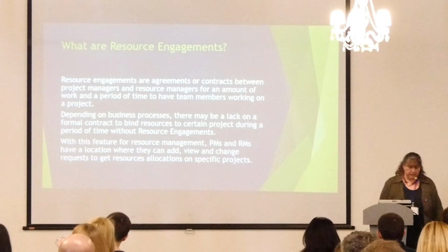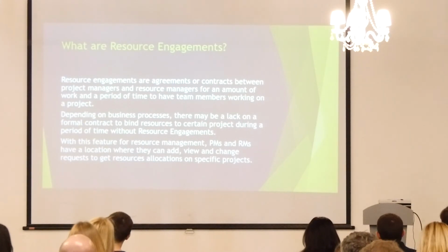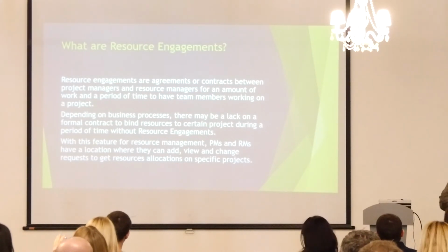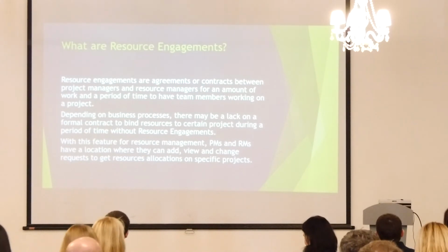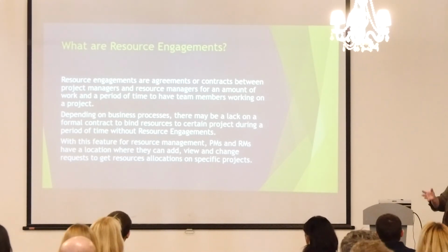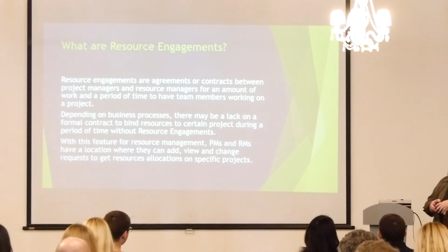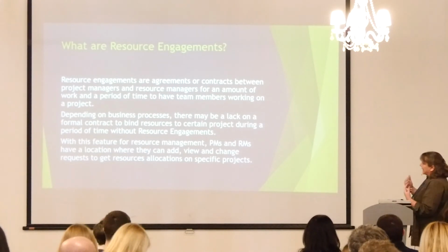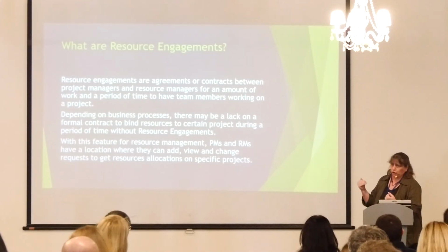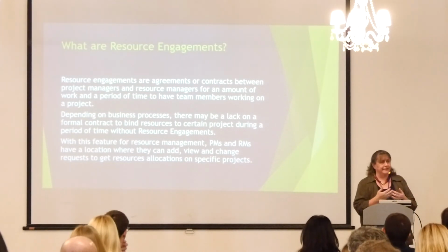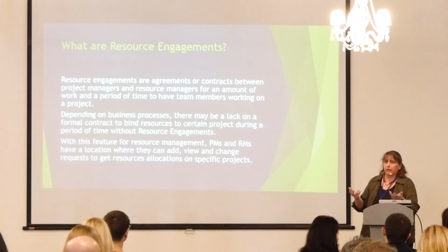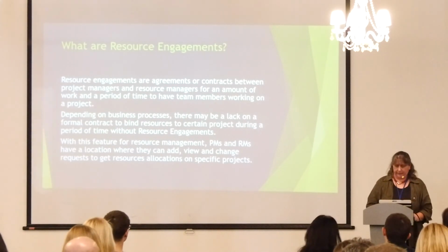So, what are resource engagements? Very often, in most companies, you're working with project contracts or project charters, where some organization is telling you, you are allowed to use this resource for X hours or days, for Y hours or months. Now you can set this up also in Project, and the project manager can see if he still needs this agreement, or if it does exceed it.